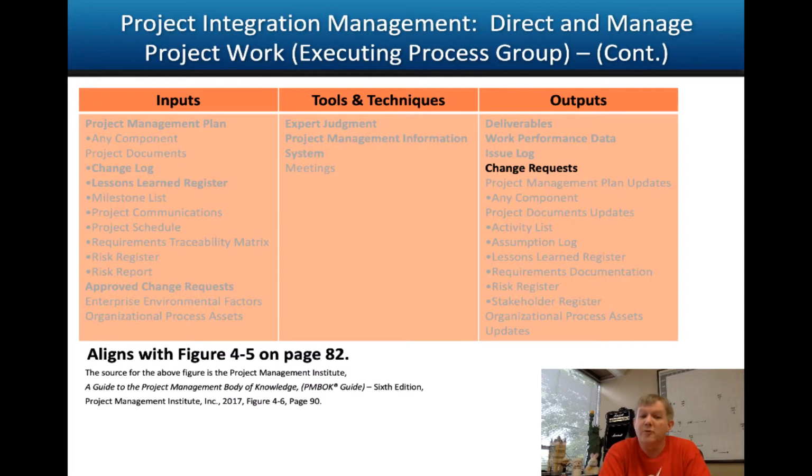Well, now it's approved at change request number 3, and thus it's an input when you're executing the process here. But that same week, say you come up with some new change request that looks like is necessary, well, that ends up being change request number 13. That's going to go with this output. That's going to go to Perform Integrated Change Control, and if it gets a yay, you do it. If it gets a nay, you don't. If it gets a hold on, then you're in a holding pattern. So that's how that works with approved change request in and change requests out.